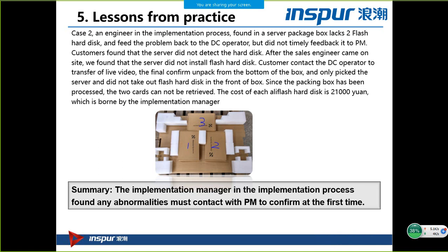For this case, usually we put the cards in the top of the package, but the delivery team unpacks the package from the bottom, so they only take out the server but leave the cards in the package.